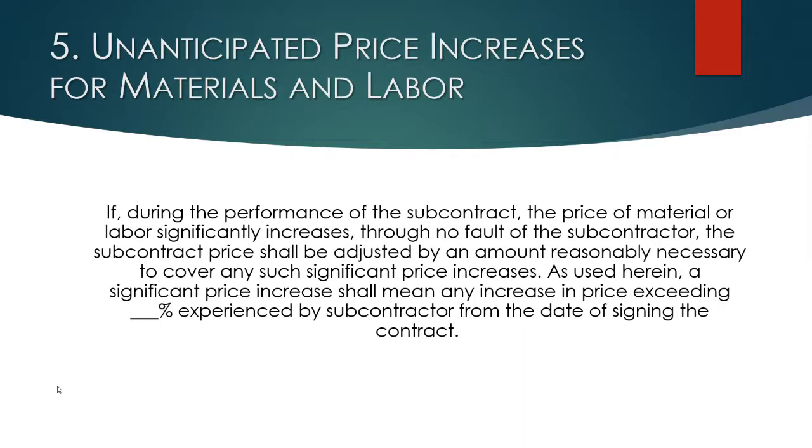And there is a trap for the unwary if you're going to do an escalation clause like this. If you limit it to a specific type of material within your scope, then you're excluding all other materials. So if you suffer an increase in a material type that is not identified in your provision, you're out of luck. So I suggest that you leave it, if you can, broad for all of your materials and all of your labor if you can.